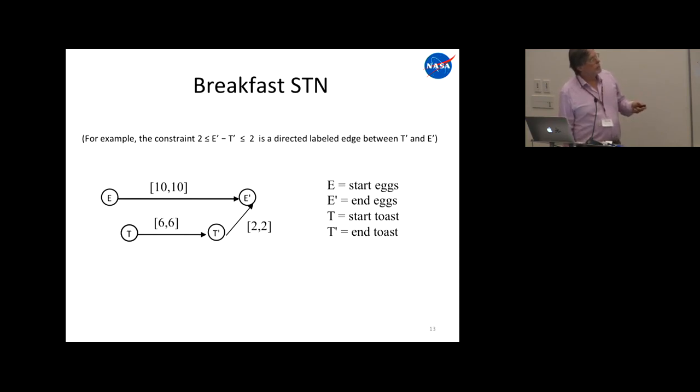Suppose this said 2, 1. What do your intuitions say? What's that? Infeasible. Yes, you can't do that. You can't say that the upper bound is lower than the lower bound. Based on the definition, you can't say that. So you'll never see that. In fact, if you do some processing and you end up like that, as we'll see, it means that your network is actually inconsistent. Okay.